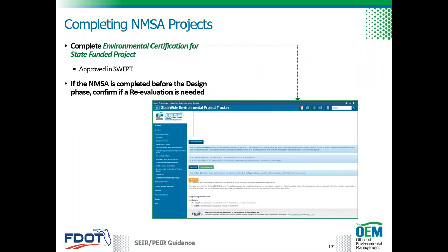Non-major state actions generally don't require a public hearing but require public involvement activities in accordance with Part 1, Chapter 11 of the PD&E manual. The district completes the non-major state action checklist and the environmental manager or designee will electronically approve it in SWEPT. After approval, they may also complete the environmental certification for state funded project form in SWEPT, which certifies that the environmental analysis has been completed and provides environmental clearance to continue the project delivery process.